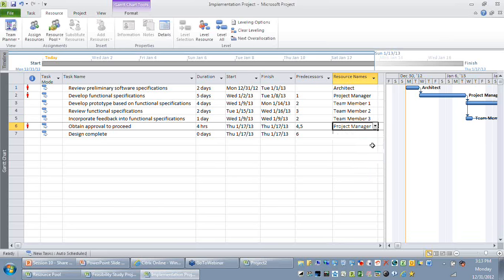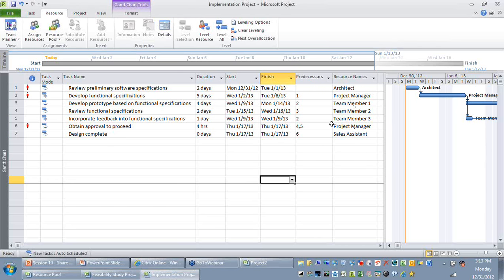Okay. So I hope you are able to see that after doing the assignment, some of the activities will have this red color stickman. If you have attended my resource optimization webinar, you would have noticed that the red color stickman indicates that these activities have some resources over allocated. So even the tooltip on top of the red color stickman says this task has resources assigned which are over allocated, and right click for optimizations.